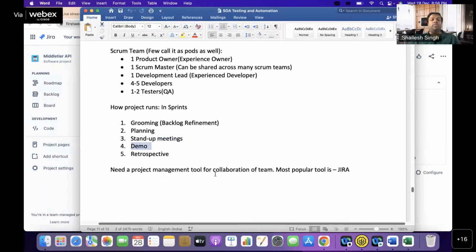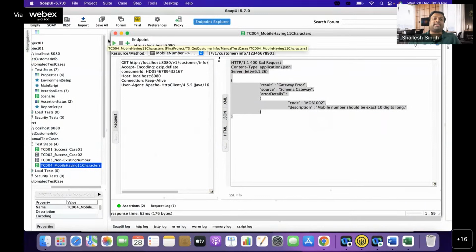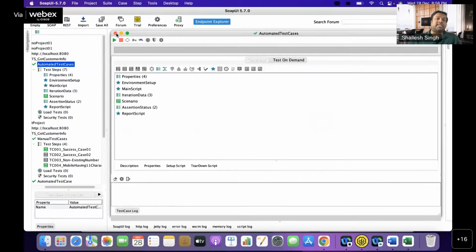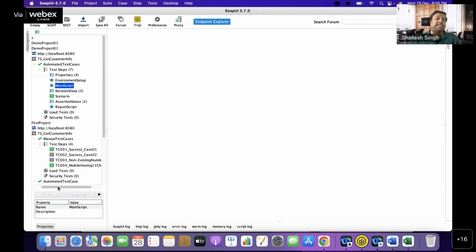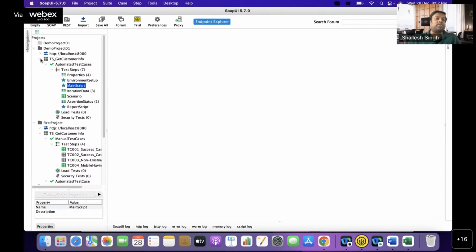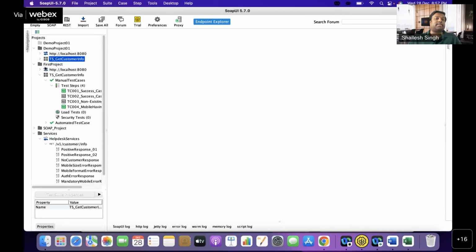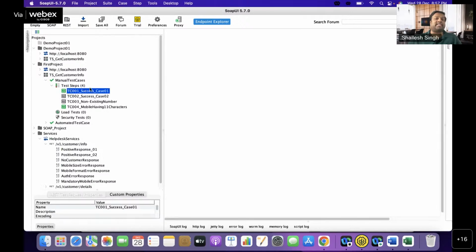Okay. So your Scrum Master will invite all the stakeholders, okay, to see what you have developed. So either developer or tester. Generally, testers are asked to do the demo because they have all the information, right? So you will not show the automation to the stakeholders. You will create 4 or 5 test cases, important test cases, and in the demo, you will share the Jira